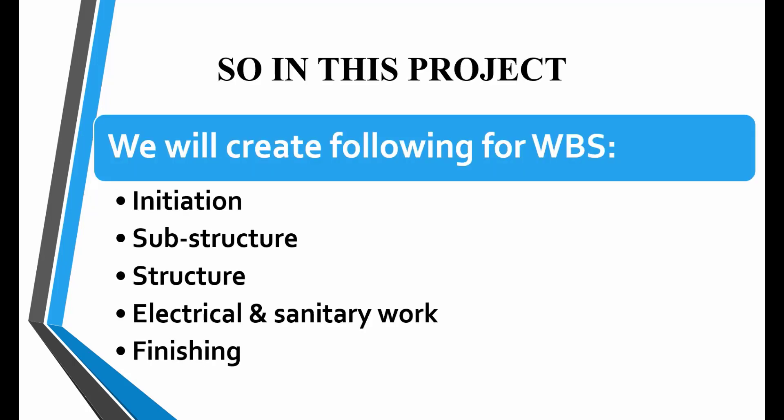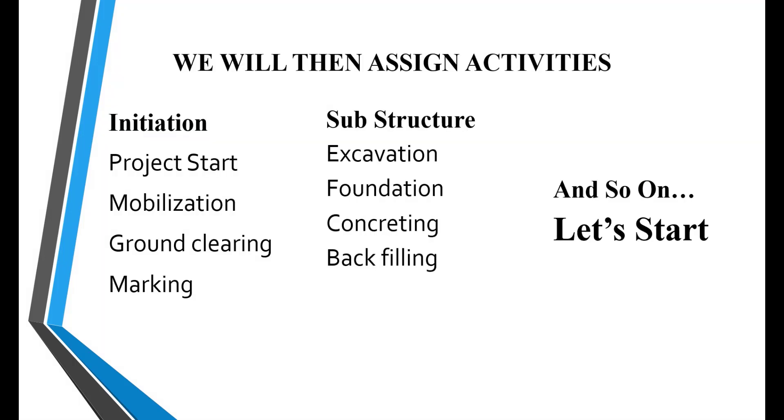So for this construction project, we will divide our work into following five phases: initiation, substructure, structure, electrical and sanitary work, and finishing. We will then assign activities to each WBS.